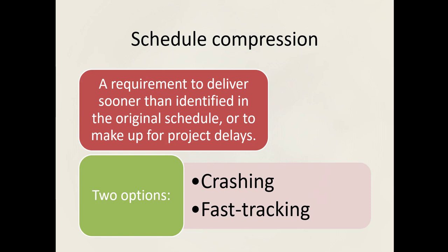Crashing isn't always necessarily bad. If you have to do a roof, for example, and only two guys show up to do your roof, in a roof job, usually you can put more people on it because someone can be doing one section of the roof and then another one can be laying it just behind them, another one just behind that. So that can work. Flooring is the same way. When you're laying out flooring, sometimes it's more advantageous to have multiple people.